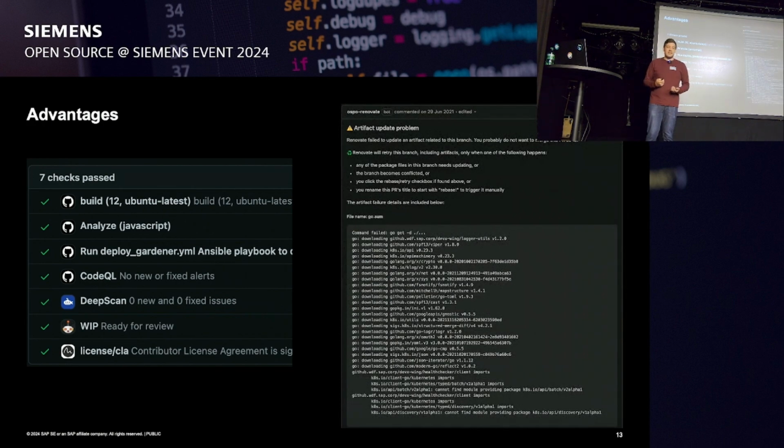If I know there's something going wrong, I maybe already get information saying, hey, this update looks like it's breaking something. A developer probably should invest some time into looking at how to make this update compatible with the existing source code, or say, hey, okay, that's acceptable, we stay on the version. And from a development lifecycle perspective, we can better plan for this and say, okay, maybe in the next sprint, somebody should take an hour or two to look at that and investigate that.